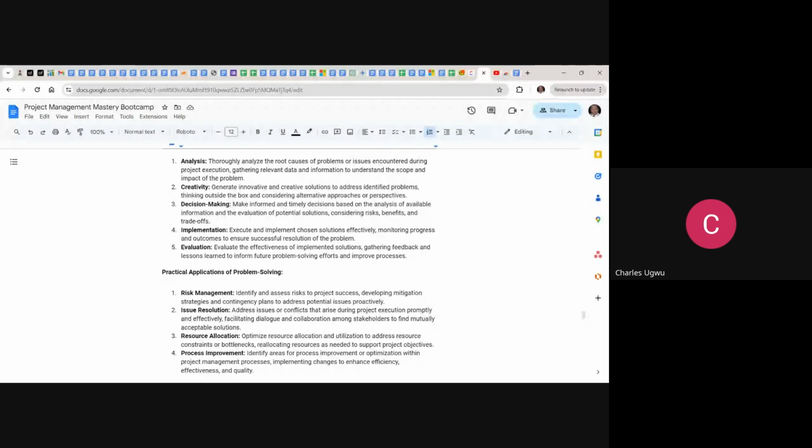Lessons learned meetings should be held while a project is going on. It is a statutory meeting that should be held at least once every week to capture lessons learned. Because at the end of every week, you need to evaluate what you and your team have done, capture lessons learned, and prepare for the next week. So it's very, very important.